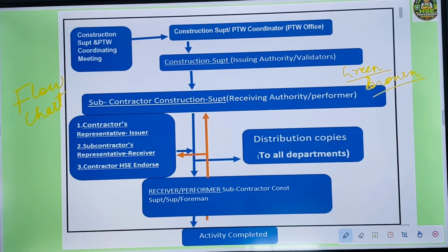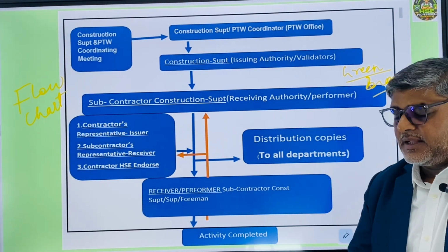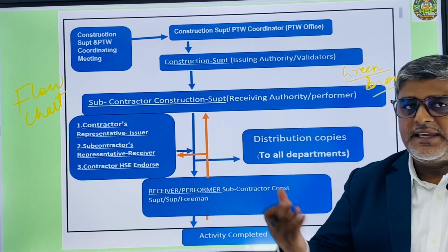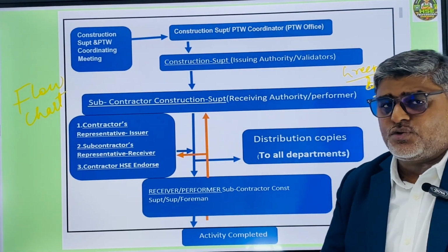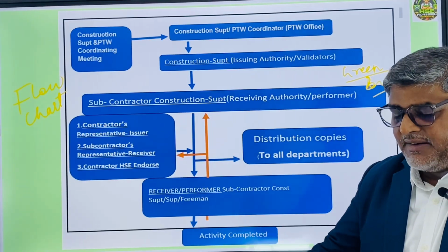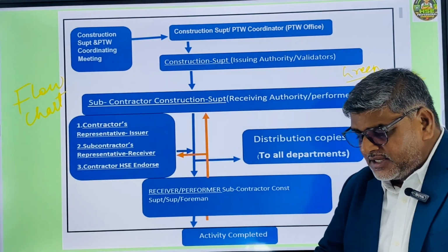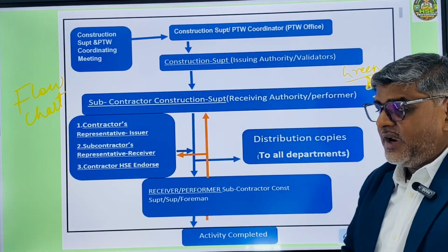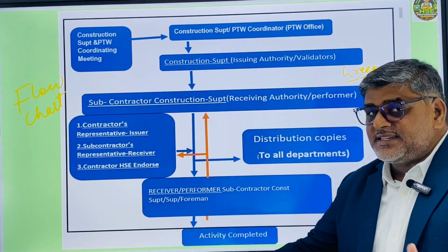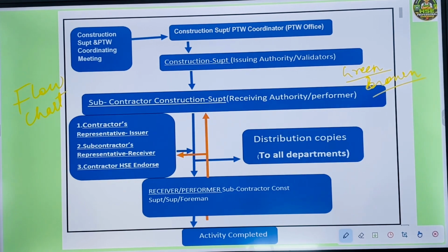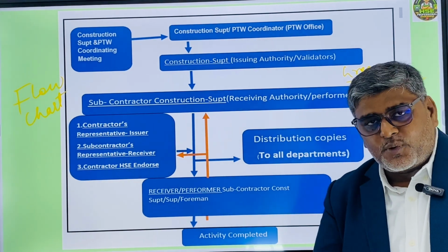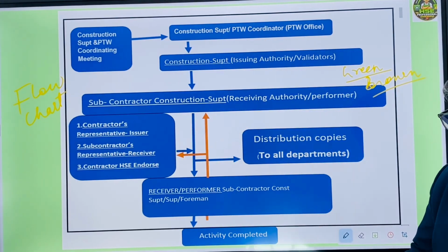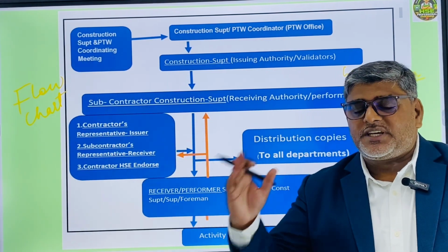First of all, in the greenfield area, my procedure is finished and approved by the client. Today is the first day, and we need to seek the permit to do some leveling, compaction, or civil work on the ground, site preparation. In that case, we need to make a team. That team, suppose the site superintendent, supervisor, and safety department, will sit together, decide this is the area, and that we need to take the permit.